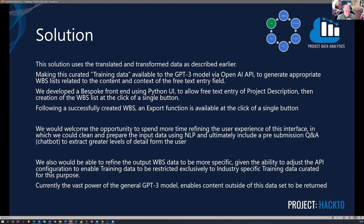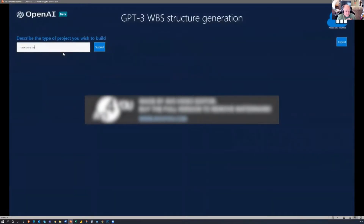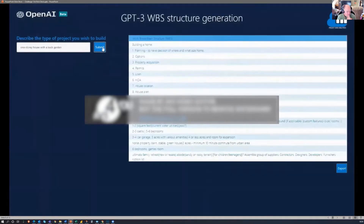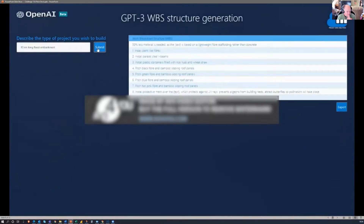You can see our demonstration here. We developed this frontend to describe your project — for example, a one-story house. You click the submit button and it pulls back a WBS. You can hit it again and see how many different variations you get, as GPT-3 can change the output. In this instance, we changed it to a flood embankment wall, and again it came up with a different WBS output.